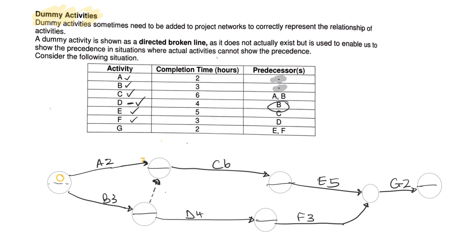So I now need to work out coming the other way. So from B, activity B has 3 there. 3 comes into here. So I've got a 2 and a 3 coming in. So the dummy activity has an EST of 3 that comes in. So 3 has to go there, because the earliest that activity C can start is 3 hours because B has to finish. Now, going along, just remembering I've done that, I've done that, I've done that.